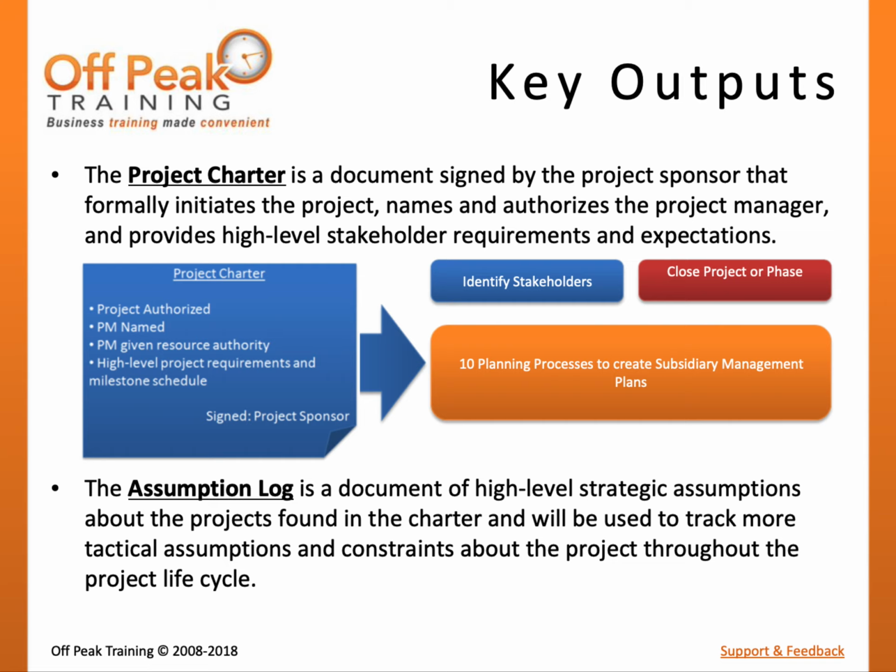The key output of this process is the project charter itself. The project charter is a project document that at a bare minimum should formally authorize the project and name an individual to be the project manager. It will be signed by the project sponsor. Since managing a project is very challenging without formal authorization, this is a very important document in the project management body of knowledge.